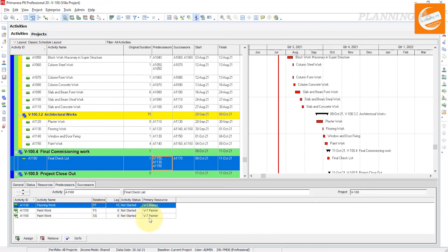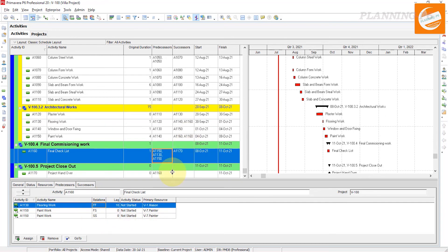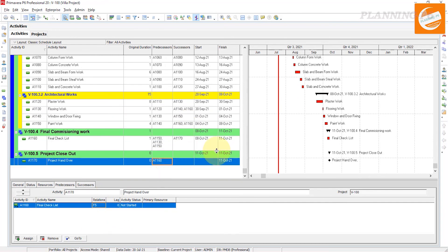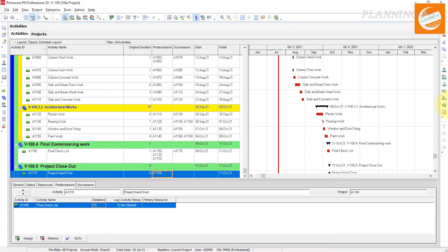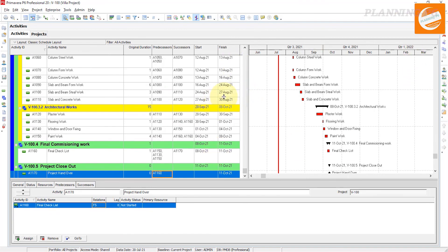We also changed the successor of one activity, which automatically became a predecessor for the next activity. The Finish-to-Finish relationship and 10-day lag are now showing correctly. This is how you can change your relationships using Excel spreadsheets. Hopefully you understand today's topic. Please subscribe, like, share, and comment on our channel. Thanks for watching — Allah Hafiz.